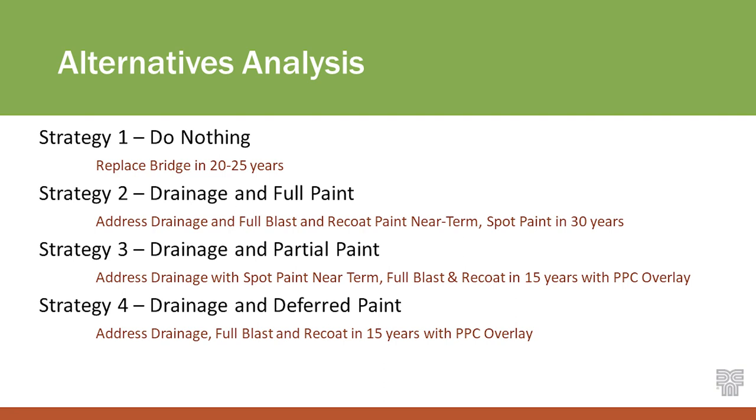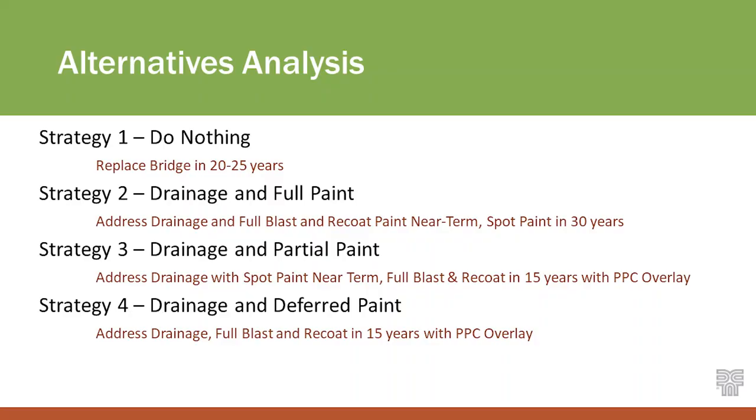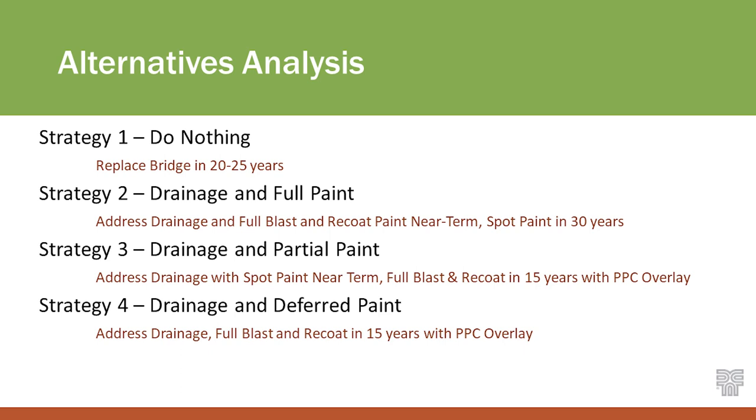So we talked about what we're recommending; then the question is when and in what order. We looked at four strategies. The first is do nothing — we can all agree that's probably not the recommended option at a preservation conference, but we need to discuss it. The next three strategies are all related to drainage and paint. We'll address drainage up front in all of them. Strategy two is a full blast and re-coat addressing all the paint in the near term, then spot painting in the future. Strategy three is drainage plus spot paint early on — less expensive up front — then a full paint when the polyester overlay needs replacement. Strategy four defers the paint entirely, the cheapest up front, then a full repaint in 15 years when the overlay theoretically needs replacing.